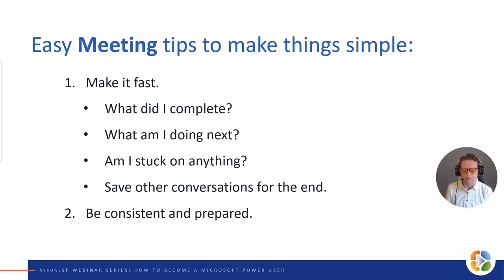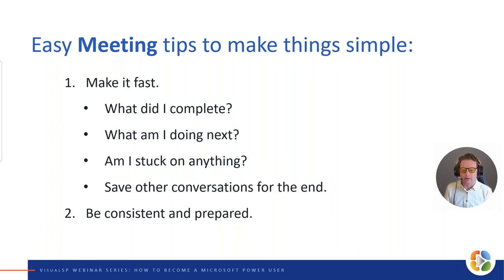That's what a stand-up meeting and Planner can really help with. First, some tips about stand-ups: remember it's called a stand-up because it's intended to be so fast no one sits down — so make it fast. There are three typical questions every participant answers: What did I complete since our last meeting? What am I doing next? And am I currently stuck on anything — do I need help overcoming an obstacle? Those conversations to get you unstuck happen at the end, not during updates.